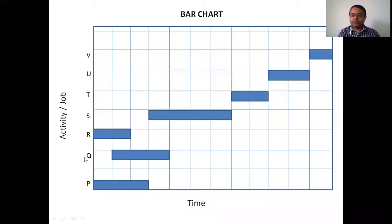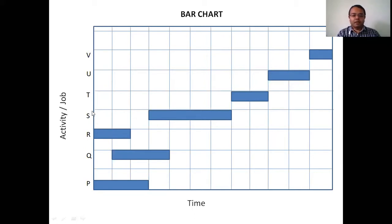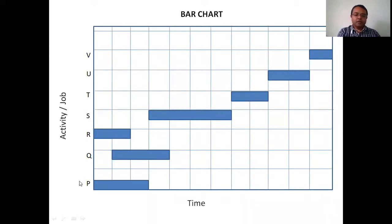Suppose if you want to construct an apartment, the first activity P will be cleaning up the site. Next, Q will be the layout. Suppose R is the excavation phase. Next, S will be concreting of a footing. Then the next level will be the first floor level, that is the casting of a slab. Likewise you can divide different activities to be done while constructing any infrastructure.